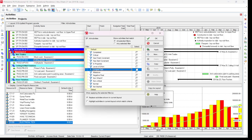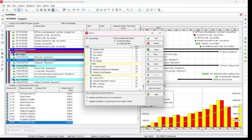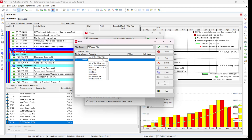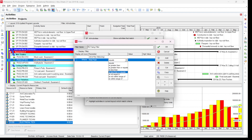Similarly, you can also create your own filter. Just click 'New' and it will open the new filter dialog box. Give it any name that is easy for you to remember. From here you can select criteria — for example, you want to see all activities which are near-critical, so you say total float is within the range of 10 to 20 days.